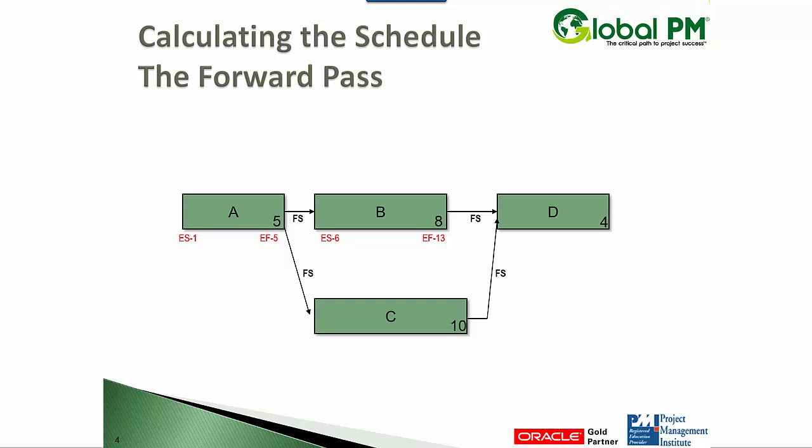Immediately after A finishes at five, B starts at six and finishes at 13. C also starts at day six, but because its duration is two days longer than B's, its finish is day 15. Both B and C have to finish before D can start. So the earliest D can start, the ES, the earliest start, is going to be 16.